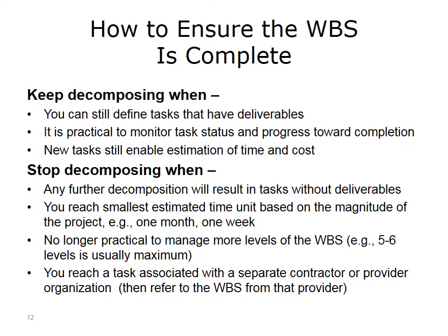We've talked about the work breakdown structure as being the decomposition of your work into smaller and smaller tasks, but when do you stop decomposing? You'll want to keep decomposing when you can still define tasks that have deliverables, and when it's practical for you to think about actually monitoring these smaller tasks for status and progress towards completion. Remember that work package tasks are used to estimate time and cost.